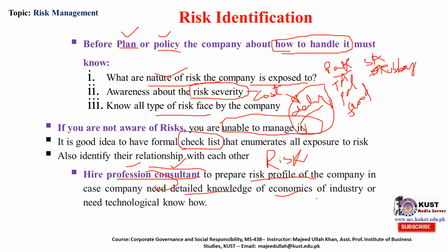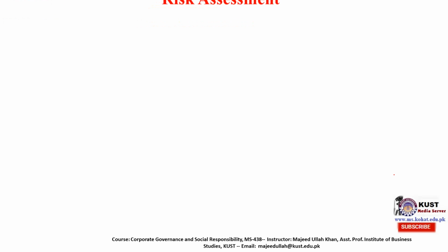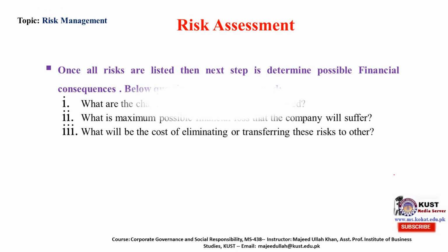It is also possible when a company pays a premium to an insurance company and asks them that we will renew our contract with you if your experts come and visit our premises and identify all types of risk to our company. The insurance company will happily accept your offer in order to identify the risk. Second is risk assessment.